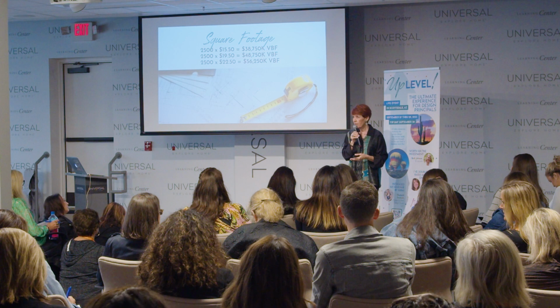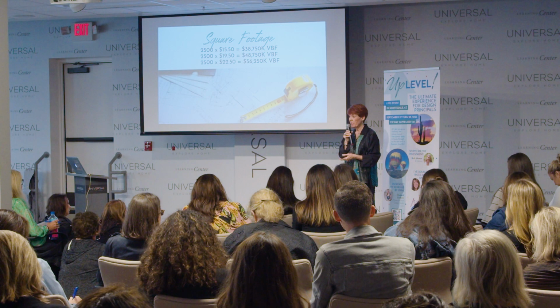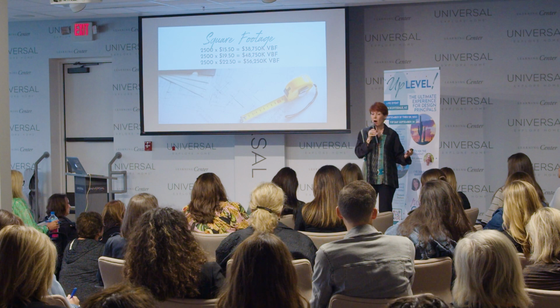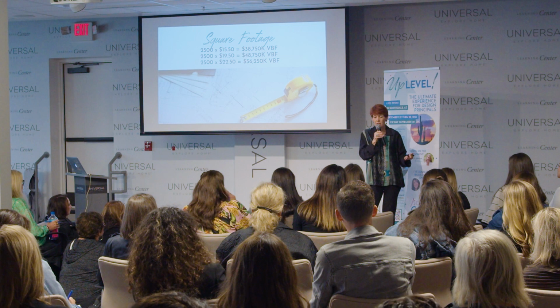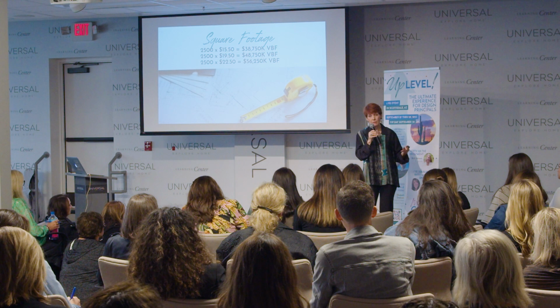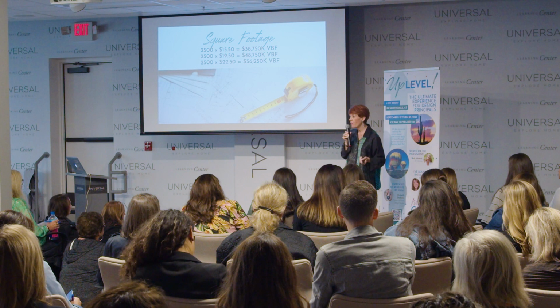I have designers I'm coaching right now. It's a wonderful firm, very talented, upstate New York. They have a boatload of business. It's incredible how busy they are. And they are having this very issue because post-Melissa, not a problem. Pre-Melissa projects are a problem because they're being hung out on the final invoice. The clients aren't paying it. They have the money. It's not the issue. They're just slowed down. 2 months, 3 months, 6 months. In one case, we've sent an attorney out. That's not fun. You have no leverage once it's loaded. Once the house is complete, there's no leverage. You have to be very careful about this, okay?